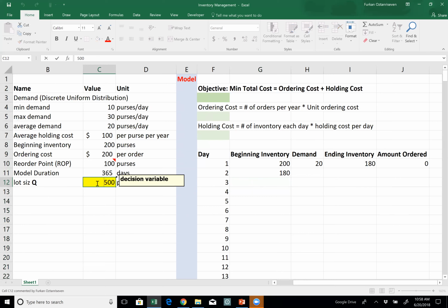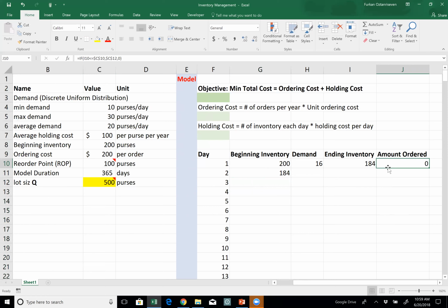I was just assuming that, so it's really not 5. Actually, lead time here is 0. Whenever I order, that order will be delivered next morning. So you may think this one is a 5-day, maybe it will take up to 5 days. That's why I'm very conservative. I make my plan based on that.